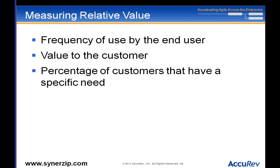You can just ask the customer what the value is for a particular feature — not overall but feature by feature. They may say, 'This is tremendously valuable — if you added this, we would pay more, order more, do more business with you, recommend you more frequently.' Lastly, how many of your customers need that? Talk to the business unit: of your customers — who are also our customers — what percentage of that market needs it? These are pretty straightforward ways of measuring relative value.